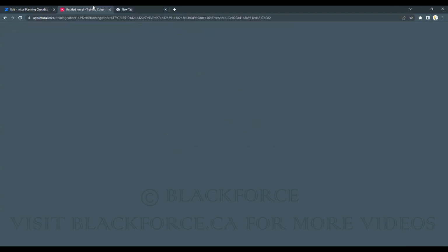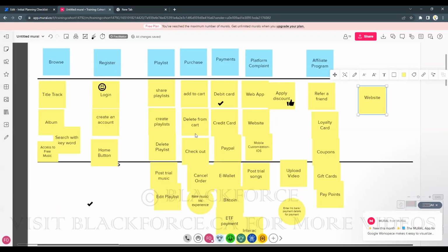So what we want to do now is estimate this as a team. When we estimate this, what we want to get from it is our initial backlog. When we have our initial backlog, we do our initial velocity, and we calculate our release one.